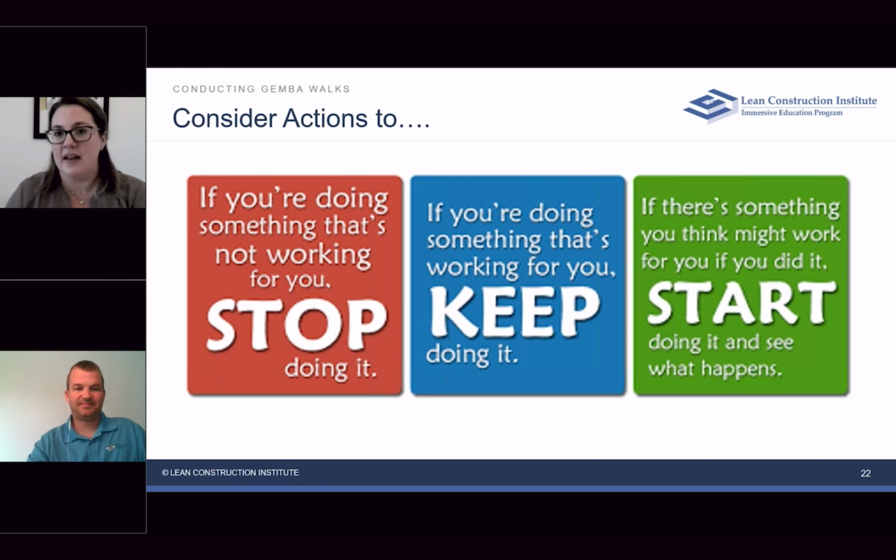It's not just the foreman, it's not just one senior journeyman, it's the whole crew that just takes 5 minutes at the end of the day. They have sticky notes up on a board that's on one of the floors, and then that way when they start fresh the next morning with their daily huddle, they have it right there in front of them. And it's been very impactful for them.